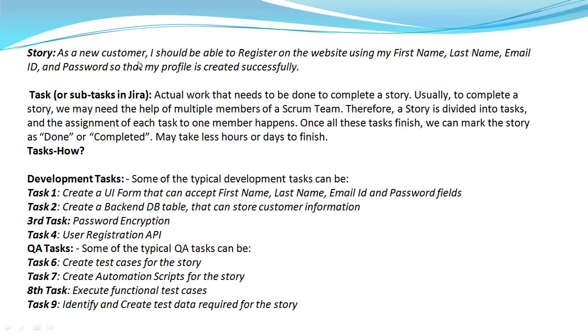As a new customer, I should be able to register on the website using my first name, last name, email ID, password, so that my profile is created successfully. So this story will be owned by one developer. For example, consider you are a developer and you may be owning it. So what you need to do is divide whatever work you are going to do. That means how you are going to complete this user story, you should be creating tasks under the story.